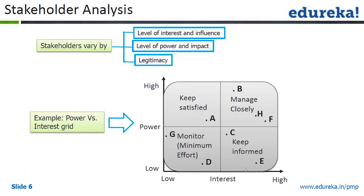On one side of the power-interest grid is power, and on the other side is interest, with low and high at each conjunction. All those people who fall in the high-interest, high-power quadrant are the people who need to be managed closely — that means you as a project manager need to talk to them every day.